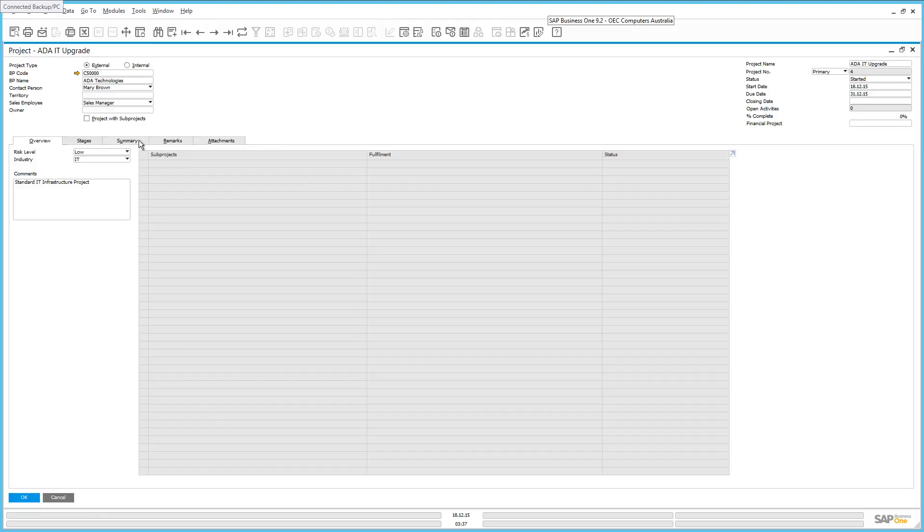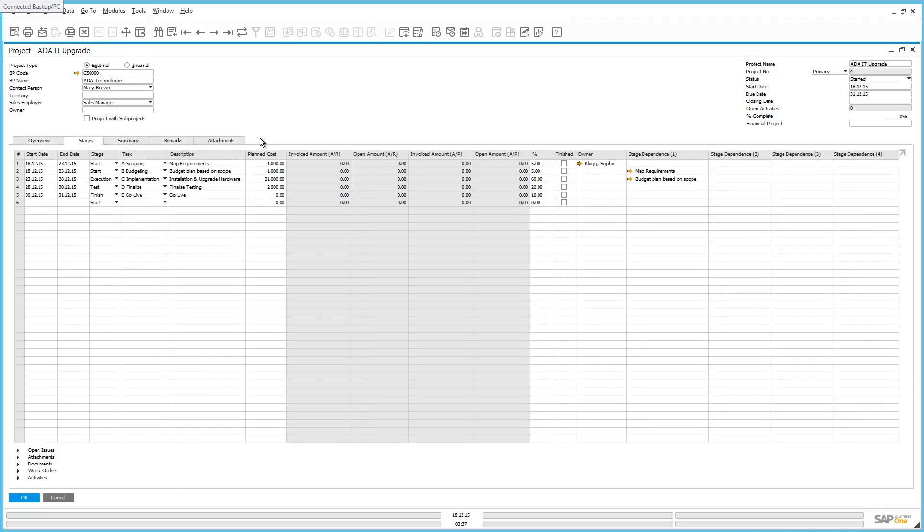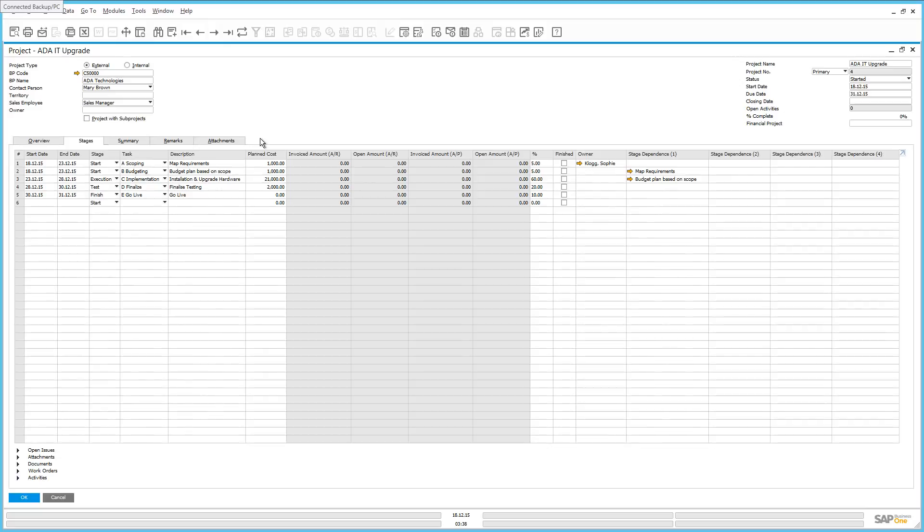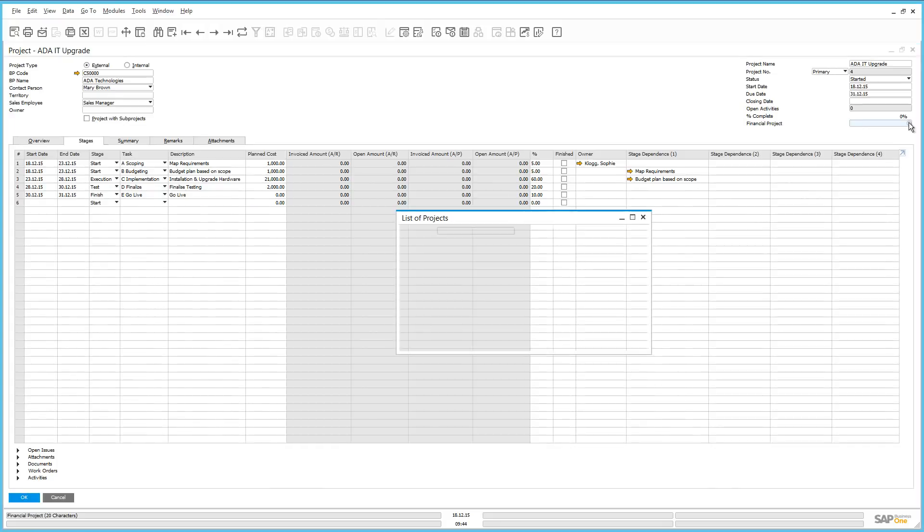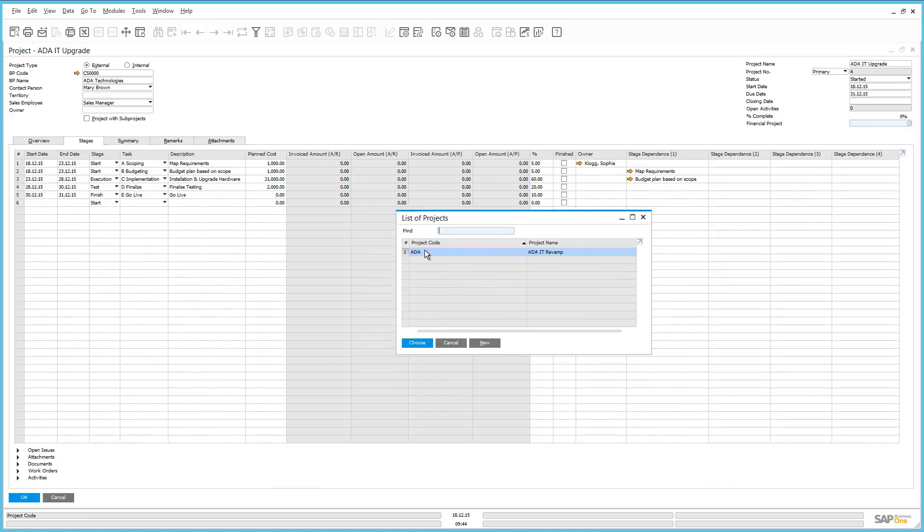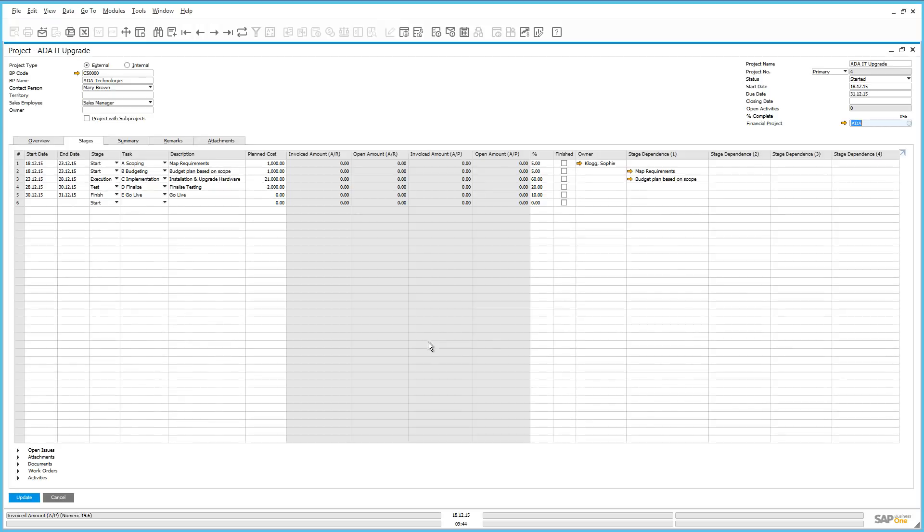Let's move on to the Stages tab. Under the Stages tab, as you can see here, we have already started the project by defining a number of stages and tasks and their start and end dates. Currently, we are just finishing off the scoping and blueprinting phase. When working with a project, we can also assign a financial project to it. In this example, we have created a financial project called ADA and this will be used on all documents generating journal entries and will give us additional reporting capabilities.